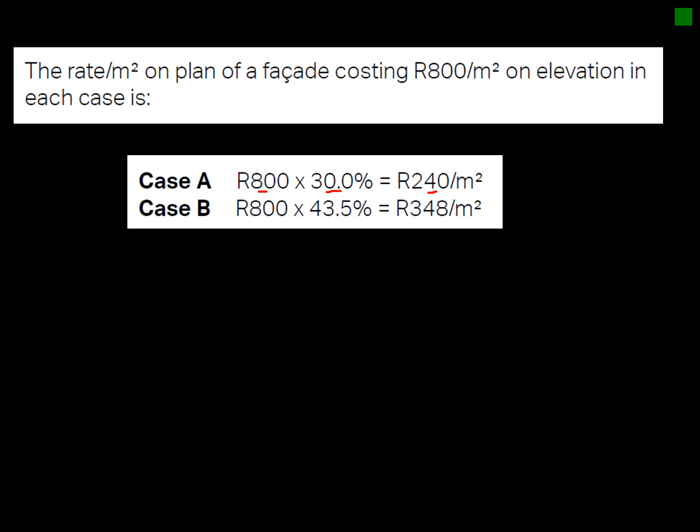This excludes finishes like tiling, which stays the same regardless of shape and won't influence the rate much. But for Case B, where the ratio is 43.5%, it works out at 348 rand per square meter. So you can see how the building shape immediately has an influence on the cost of the external facade, though not necessarily on the rest of the building.